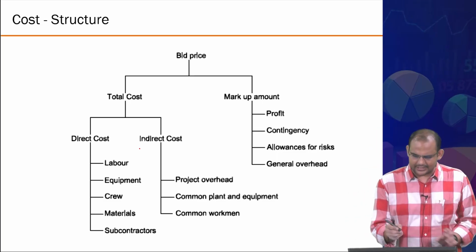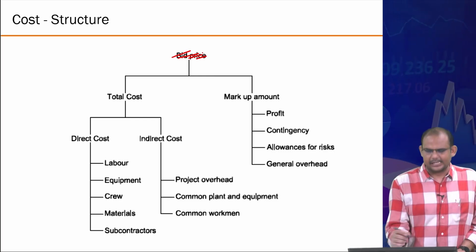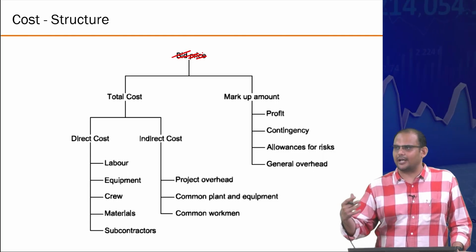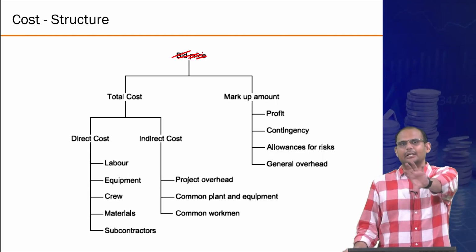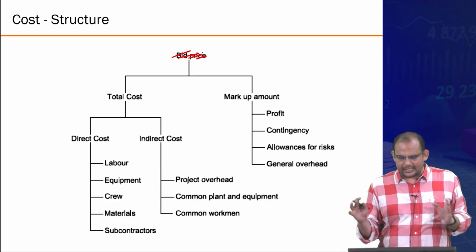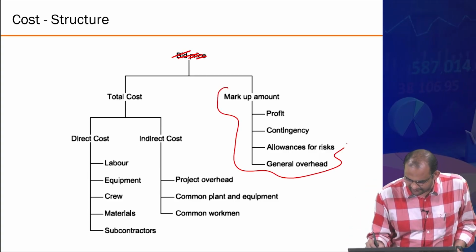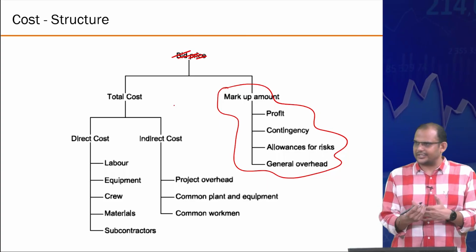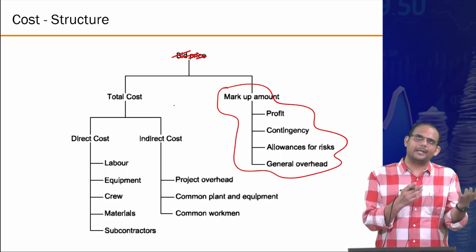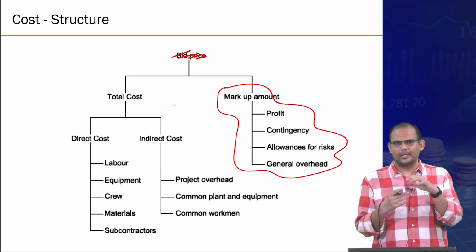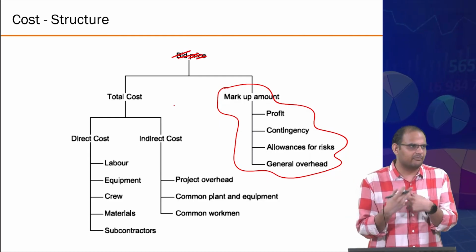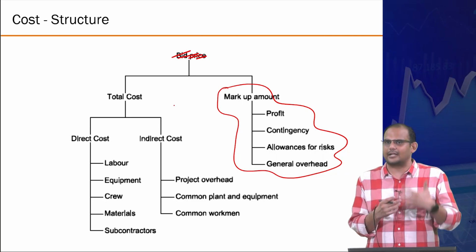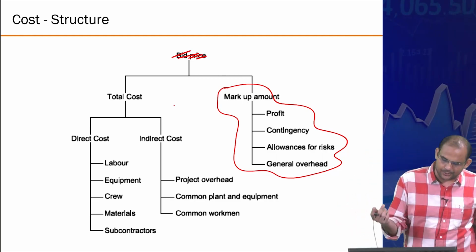Again, this is not directly related to our discussion topic, but a typical bid is essentially the price that a vendor or a subcontractor quotes, saying I will do this work for this much amount, right? In a typical bid, of course, there is some profit percentage margin, but it also involves a component of cost. If I have bid 100 rupees, it could be that 20 rupees are my expectation of profit for the risks that I'm taking, and 80 could be my actual cost. It's not like 100% of it is coming into my pocket, right? There is a cost to actually do that service.